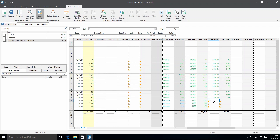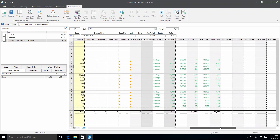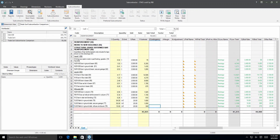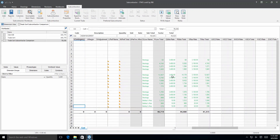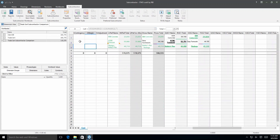Now all the subcontractors' prices have been entered, we can see that both quotes are very different to the estimate price. This is caused by an estimate rate input error. To rectify this, we need to unlock the workbook first and then edit the estimate rates. After this, we can click the same button again to lock the workbook and prevent error entries. The objective now will be to select the second subcontractor for the bar reinforcement and the first subcontractor for the fabric. To do this, return to level 1 of the workbook, click the trade properties button, untick the single preferred box and click OK. Now drill down to level 2 of the workbook and select all the figures in the low name column, then click the make preferred button. From here, select the first subcontractor for the bar reinforcement and the second subcontractor for fabric. Returning to level 1 of the workbook, we can now see that both the first and second subcontractor's names appear in the preferred name column in the reinforcement row.